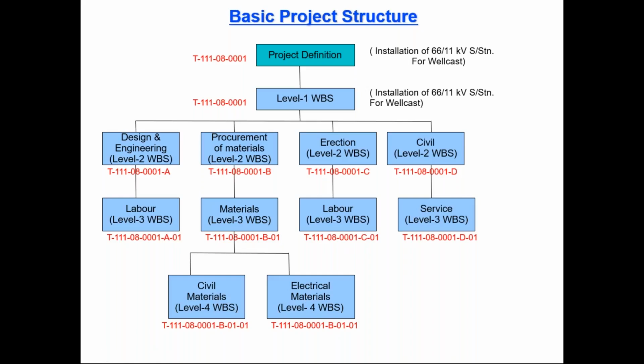So we need to create a structure till the level where we can manage it. If you are able to manage it at the 12th level, 10th level, 8th level or even 20th level, you can create it. But as per best practice, we should create this structure till the 5th level only. If you have so many levels, you need to think of squeezing it to a certain level only. Whatever codes we define at the definition level are extended as per the levels of the WBS element.